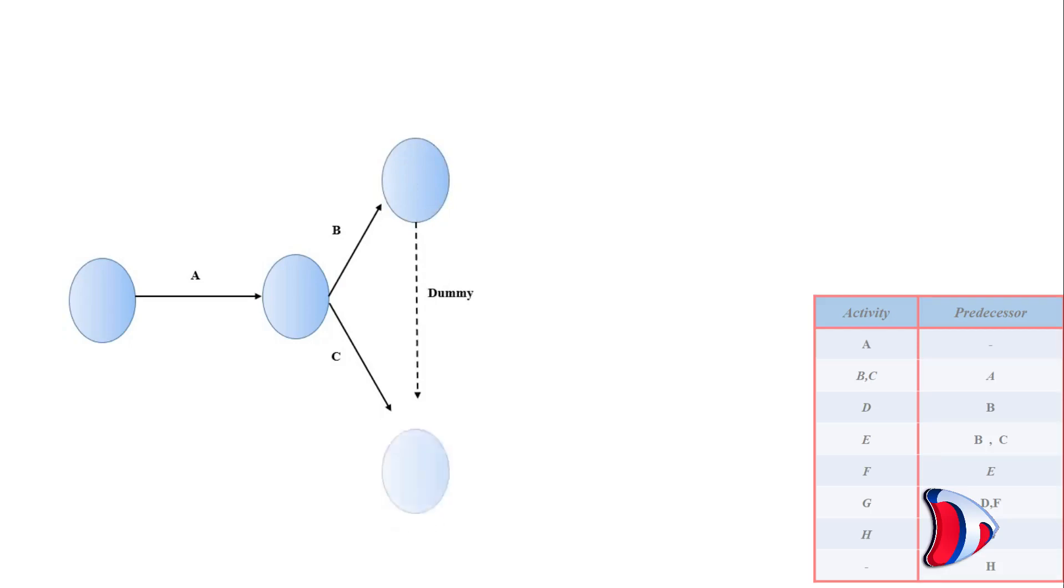Now since activity D emerges from activity B independently, while activity E emerges from combination of activity B and activity C, hence the dummy activity is introduced which originates from activity B and merges with activity C, from where activity E shall start. Also, activity D originates from activity B. Further, activity G starts with a combination of activity B and activity E, and afterwards activity H originates from activity G. Since from predecessor H no further activity originates, the PERT is complete.